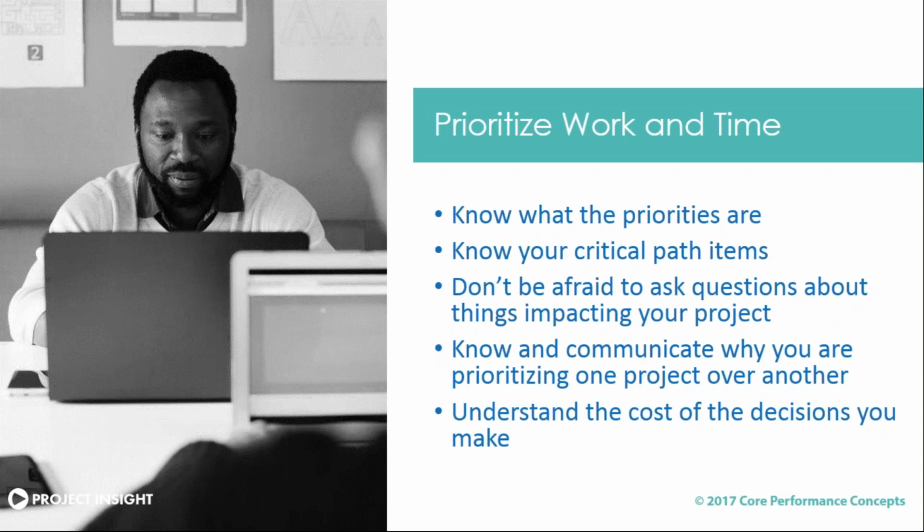They're pretty accurate. I said, but do I just assume that everything is going to be ready next week, by the end of next week? No, I had a quick 15-minute phone call with the team that needs to make sure that it happens. We talked about how we're going to do it, what's missing, and give them a target date. I said, I need this stuff done. Other than this one dependency, I need this updated and ready to go by the 1st of December.